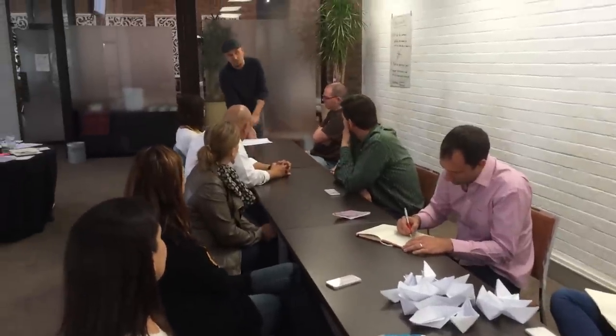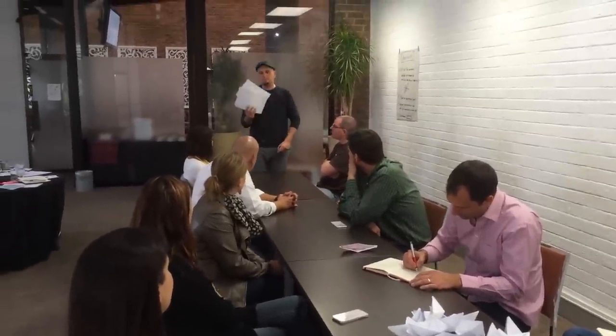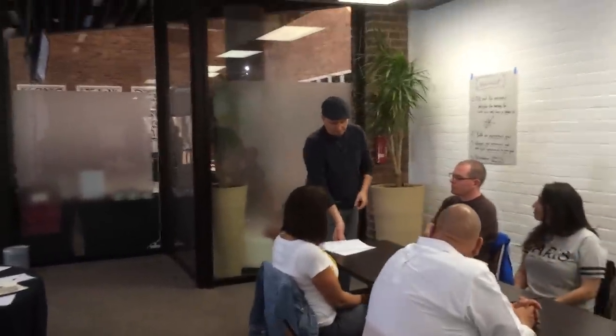So that's also the point why this is treated as options. That's an option that we finish this work, but it's not committed yet. So commit as late as possible, but if you commit, work on it fast. This can only be done if you're working in a limited system. Does it make sense? One more thought experiment.